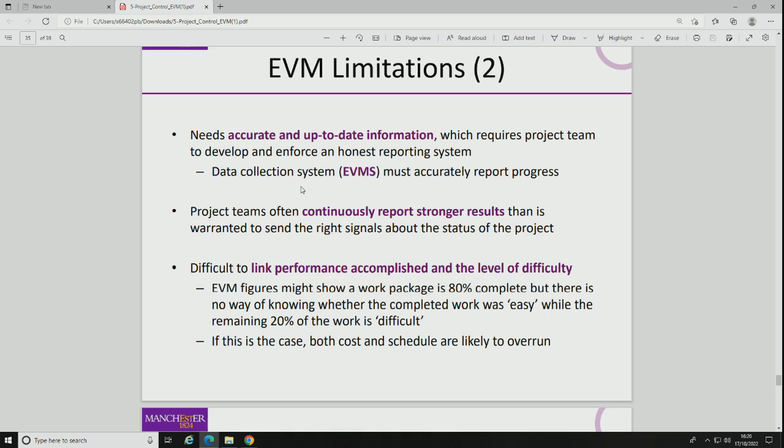So the engine room is the actual cost, the earned value, and the plan value, the CPI and SPI indices, the budgeted cost at completion, and then you've got these things which are derived, like the estimated cost at completion. There's a likely remaining estimate, which is from the supplier, and that can be used to create an estimate of cost at completion as well, or a variance at completion. And then there's a few more complicated things in terms of looking at the CPI and CPI-SPI forecast of estimate at completion, which is quite a complicated expression, but it's really using those indices as a basis of adjusting the existing budgeted cost at completion number.